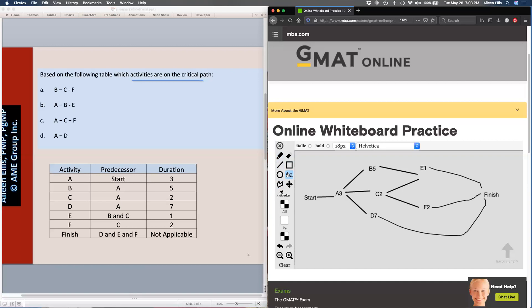Now I have my diagram and I'm going back to the question: which activities are on the critical path? I look at answer A: B, C, F. Well, that's not even a path and it doesn't have A on it. A has to be on the critical path because it's the only way through. So I know answer A, B, C, F is wrong.